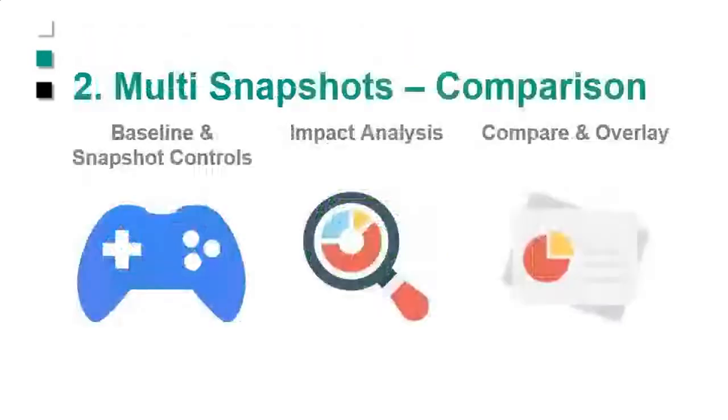And then you could do all sorts of good things with the snapshots. The snapshots let you do comparisons much more readily than taking a baseline every time you do an update. So you can do impact analysis. You can compare time over time data: this week's with last week's, with last year at this time. You can do all sorts of fantastic analysis because of the snapshots.